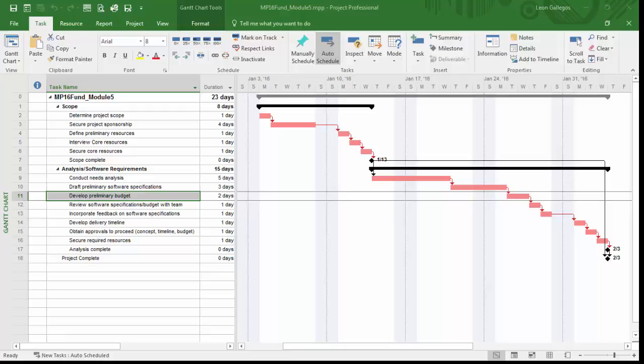The idea behind lag time is giving us a buffer or delay between our tasks. It can be used quite often when we're waiting on something - waiting on maybe a customer, client, or subcontractor to deliver something. When we know there's going to be that delay, we set up lag time between our tasks.